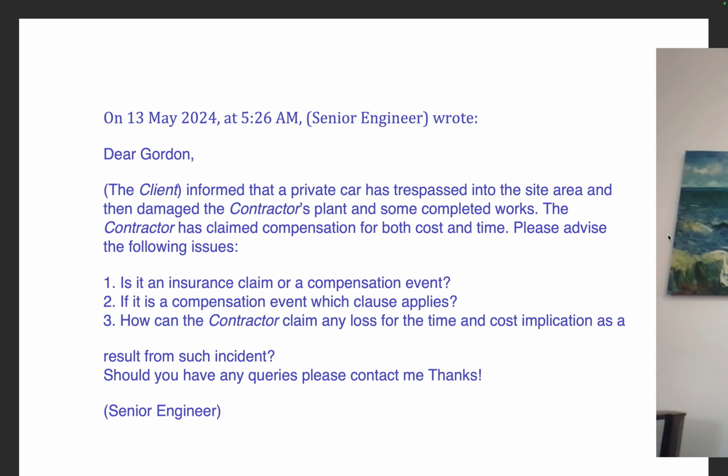In fact, this number 1 can be rephrased as the following. They may ask, is it a contractor's liability or a compensation event, then very obvious. The keyword here is contractor's liabilities. Or some of you may think, oh, maybe it's a client's liabilities. Doesn't matter. So the keyword is either contractor's liabilities or client's liabilities. So let's say you pick one. You say, oh, I forgot which one is which. You pick one. Let's say you pick contractor's liabilities. Then you go to the index section. If you have got a contract with you, okay, if you go to page, let me see.